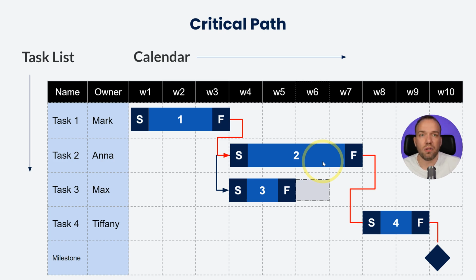for fast tracking. For example, back to the example with the house. Imagine you're building floor 1. You cannot build floor 2 in parallel because floor 2 requires floor 1 in the first place. But in other cases, on other projects, maybe some of the activities are suitable for fast tracking. For example, you can write a book and in the same time, after you complete a certain chapter, you don't have to write the book in full, but you can submit the completed chapters for editing. So that's a form of fast tracking, making work in parallel.